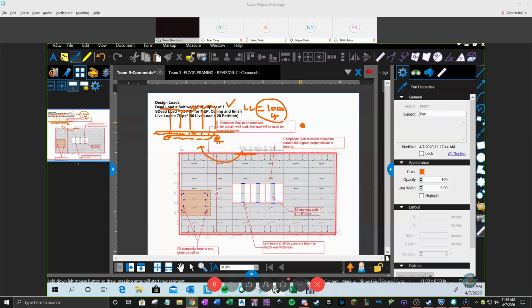Okay, this is the section I'm going to draw. Typically during the construction, core construction goes ahead, right? And then followed by the steel column and steel framing.